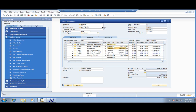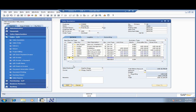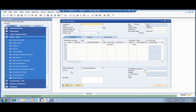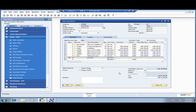You can define these templates to whatever meets your requirements with your projects. In this case, we've got some installation services, a server, and some IBM printers, and then also some testing before we wrap it up. We've already got a template set up in the software for a network installation. Assuming that Fred has accepted the sales quote, we'll copy it down to a sales order, and from there we can move it right into a project and get it on the schedule.